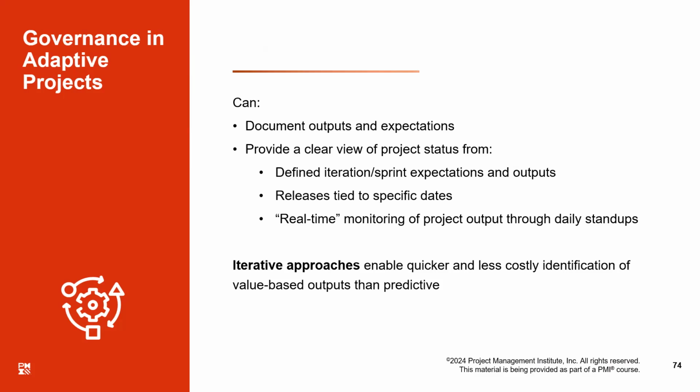Then, what if you have more than one project team working at the same time on the same project? We will consider that the next level of governance. Maybe there are 10 teams working. They are all considered separate projects. There are 10 projects, 10 Scrum Masters, and 10 product owners, and they are all concentrated on their work, but they must all be reporting to someone. A level up, a scaled up level, is the level which provides governance to the individual Scrum teams.